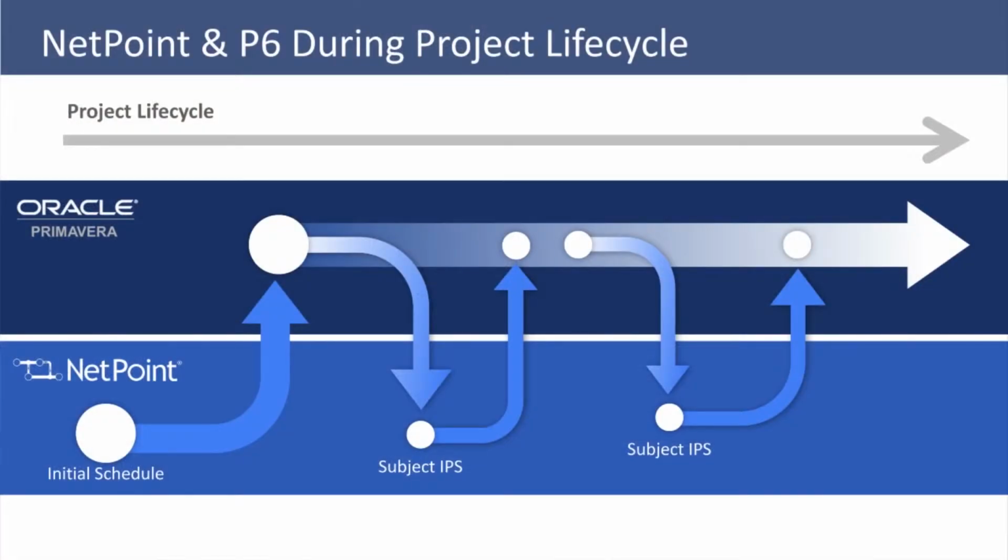We have a CM that just got onboarded in the last couple weeks. And PMA has been involved for the last year. So during that last year, we were taking the schedule through early development, schematic design development, starting from 0 and moving towards a NetPoint file that had about 500 to 800 activities. It was at that point that we rolled it into Primavera to allow for more detailed planning and to allow for, this will be an integrated schedule, so we'll have XCRs from the designer and the CM and the validation company all working in harmony together.